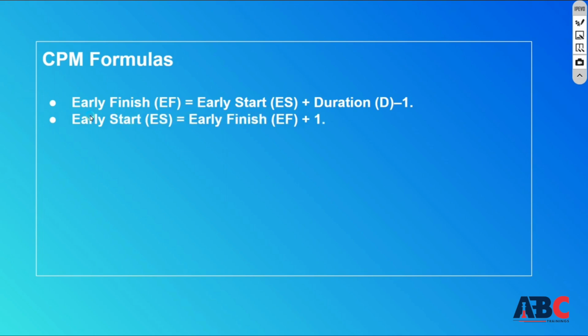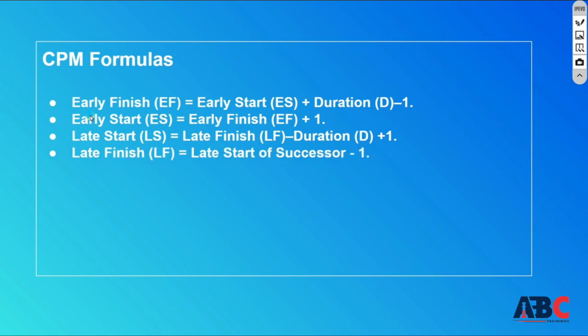Early start is early finish plus 1. So if you have started early, then you will finish early. Late start means late finish minus duration plus 1, which equals your late start. In the same way, to calculate late finish, it is the late start of the successor minus 1. It means if your project has started late, your late finish will be later.